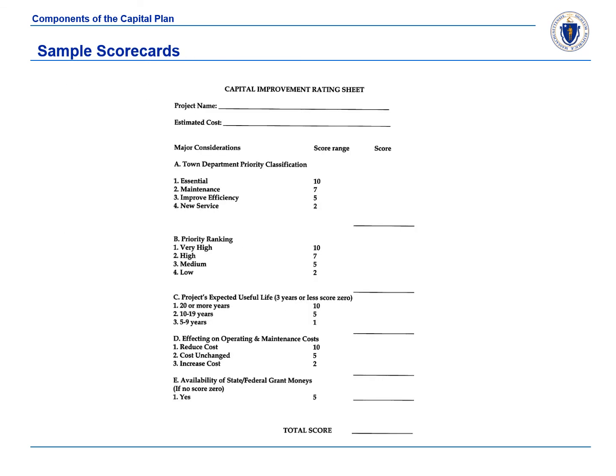A capital project scorecard, a sample of which is shown here, helps formalize a community's priorities into a points-based system. Members of the reviewing body will assign points to a project submission, with different factors weighed more heavily. Projects may then be prioritized based on how highly they are scored. Adopting sound policies, allowing adequate stakeholder involvement, and giving careful thought to how these scores are determined is vital in creating a useful and objective scoring system.